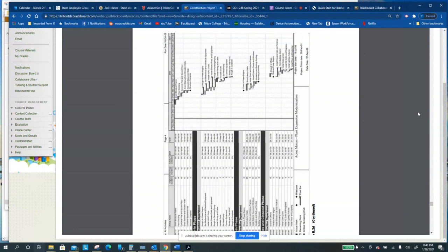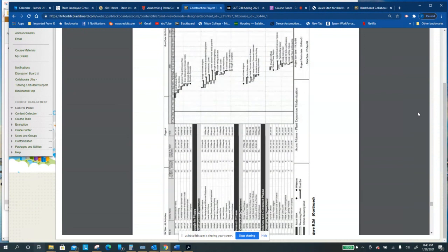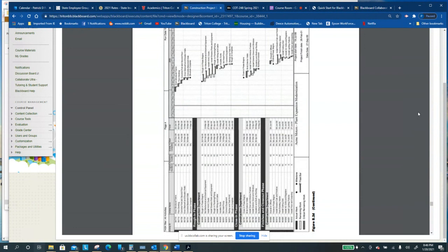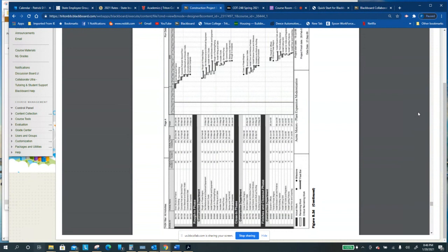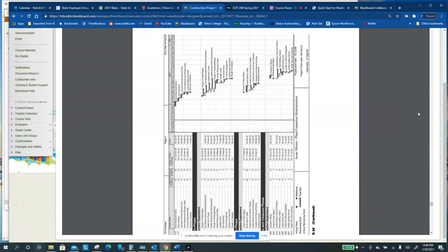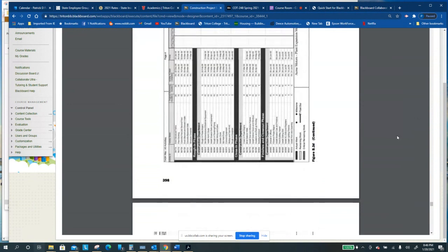It's the under-promise and over-perform kind of thing. It looks a lot better if you finish in 10 hours when you told them it was going to take 20, and you feel like a hero. But you might lose the job, because your price might be high since you overestimated your man hours.